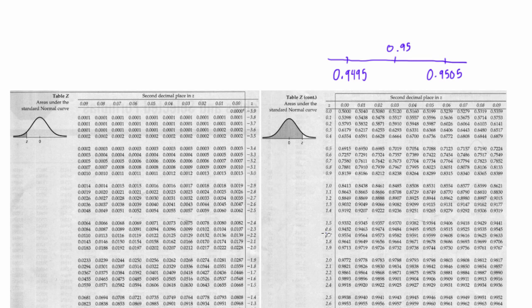So our z-score will start out with 1.6 and it will actually be exactly halfway between this value and this value. So then we have to consider 0.04 and 0.05, and exactly halfway between those values—if we had another number line with 0.04 and 0.05—exactly halfway between that would just be 0.045.